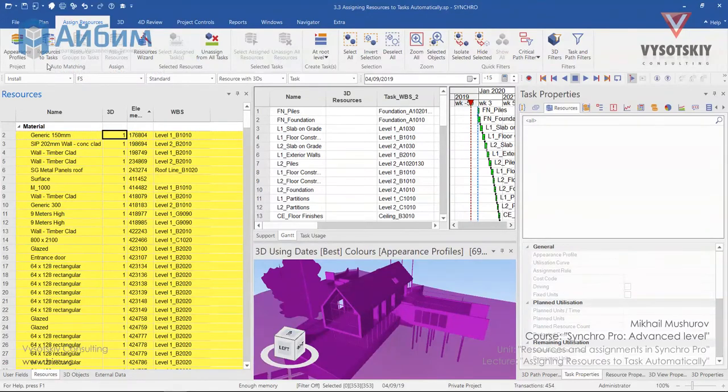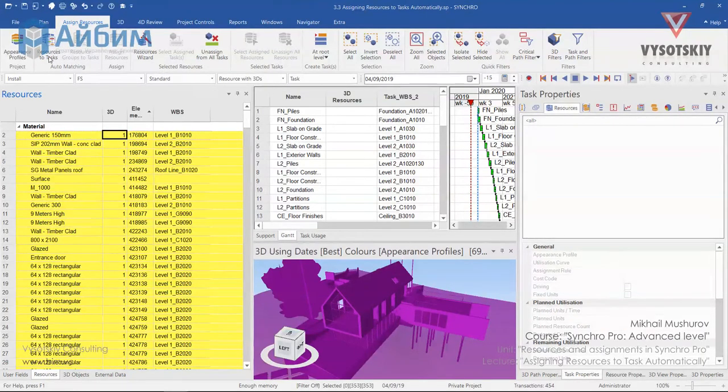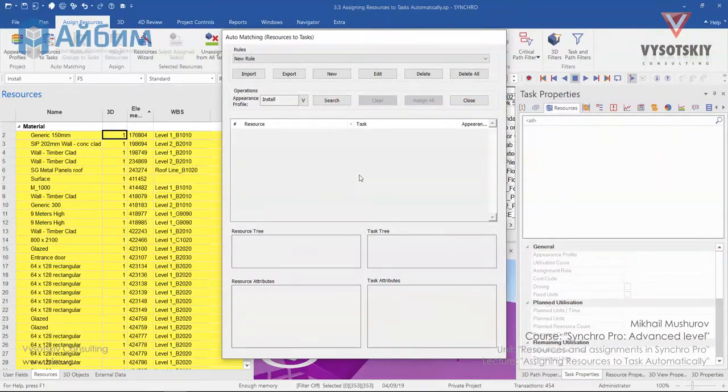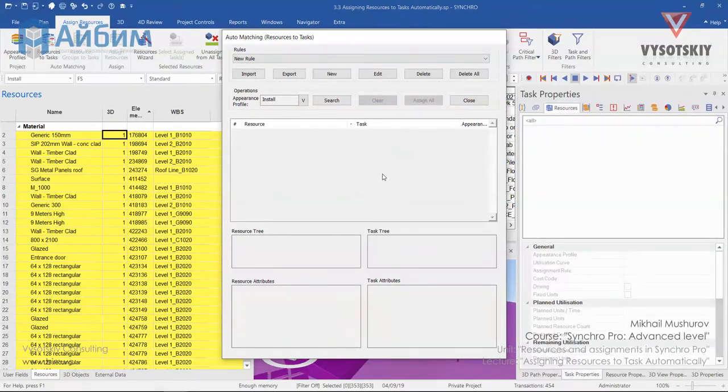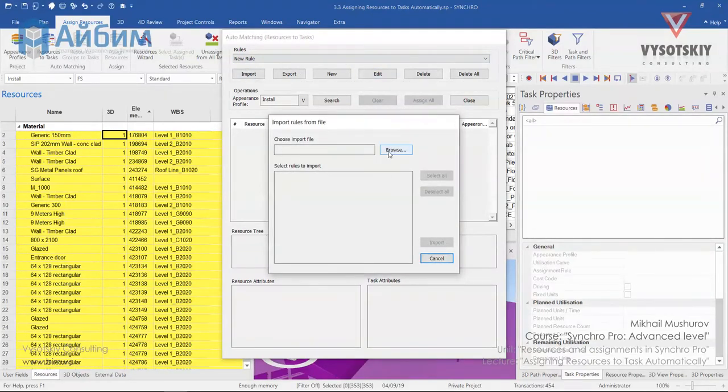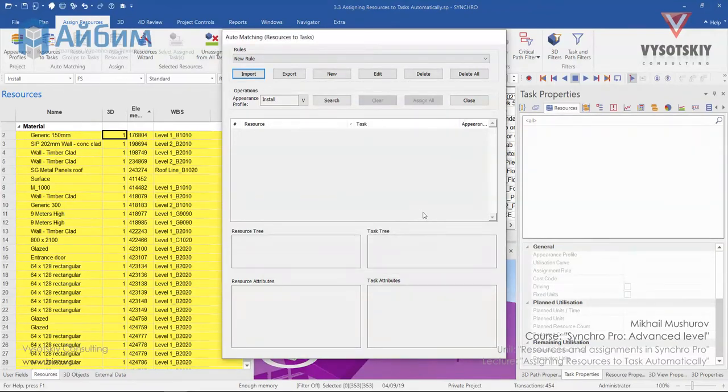Now open Assign Resources tab, Automatching and Resource to Tasks. This feature allows automatically assign resources or resource groups to tasks by using filters and rules. We can import previously exported Automatch XML file via Import. We will test it upon creating our own Automatch rule. Now let's go ahead and create our own rule. Press over New button.